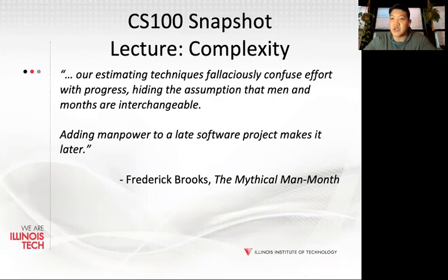You could find or buy something that is reusable, very good. Try to remove complexity, excellent. Presuming we're coding and not testing, I'd move on from testing, make sure what was completed on schedule was rock solid, reduce the deliverable, try to have the best release possible for what can be written and bug fixed on time. Very good. So sort of go back to the drawing board in a way, sort of work with the client, maybe figure out, hey, can we reduce what we need as a minimum viable product, right? So-called MVP, right? Excellent ideas, everyone, right?